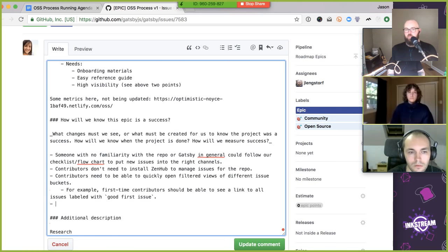The core maintainers would then write out the context, remove the needs core maintainer review status, and add help wanted and potentially a level of difficulty. So it's like, this is a good first issue, or this is a good issue for somebody medium familiar with the code base, this should take a day, this is going to be hard, that kind of thing. Because somebody like Mikhail is going to have that information, whereas I won't.